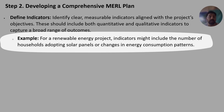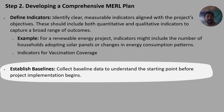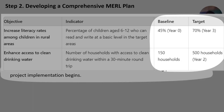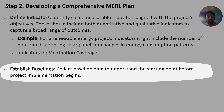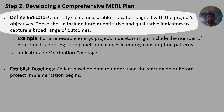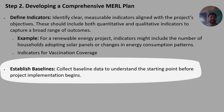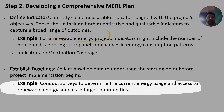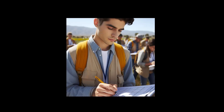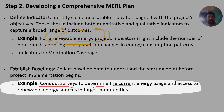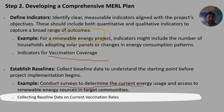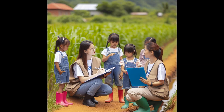For example, if you are working on a renewable energy project, your indicators might include the number of households adopting solar panels and changes in energy consumption. Next, establish baselines by collecting baseline data — a starting point — before project implementation begins. For the energy project, conduct surveys to determine current energy usage and access to renewable energy sources. For a health vaccination project, collect baseline data on current vaccination rates.